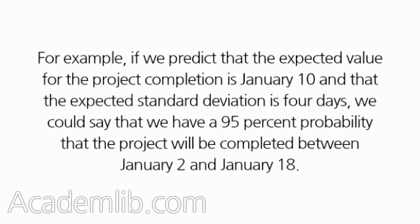For example, if we predict that the expected value for the project completion is January 10 and that the expected standard deviation is 4 days, we could say that we have a 95% probability that the project will be completed between January 2 and January 18.